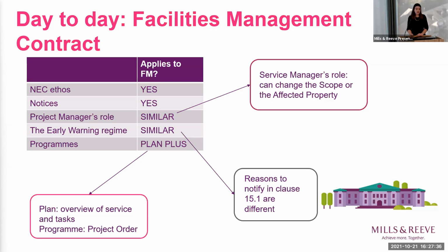And much like the term service contract, the planning is an overview of the service and the tasks. And the programme is for project orders. So under the facilities management contract, there's an option to allow project orders that you would have to select, which then allows you to have internal, individually identified task projects, as they call it in this form, against which you would have a full programme.